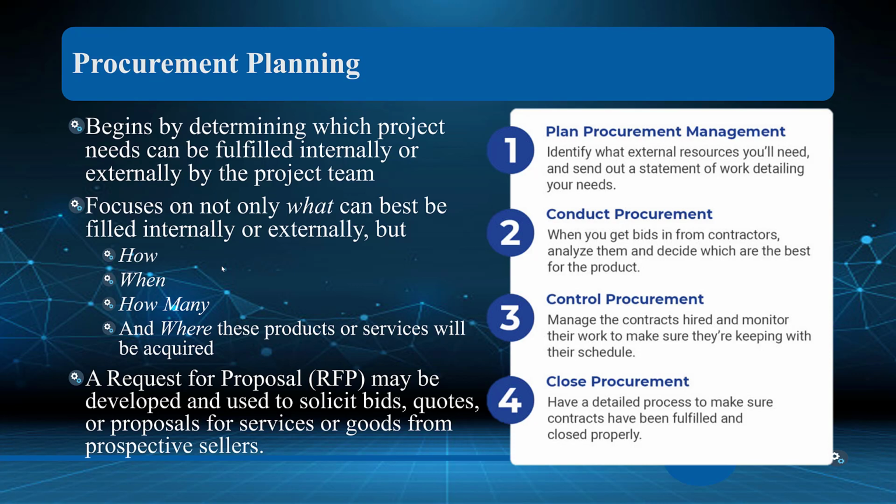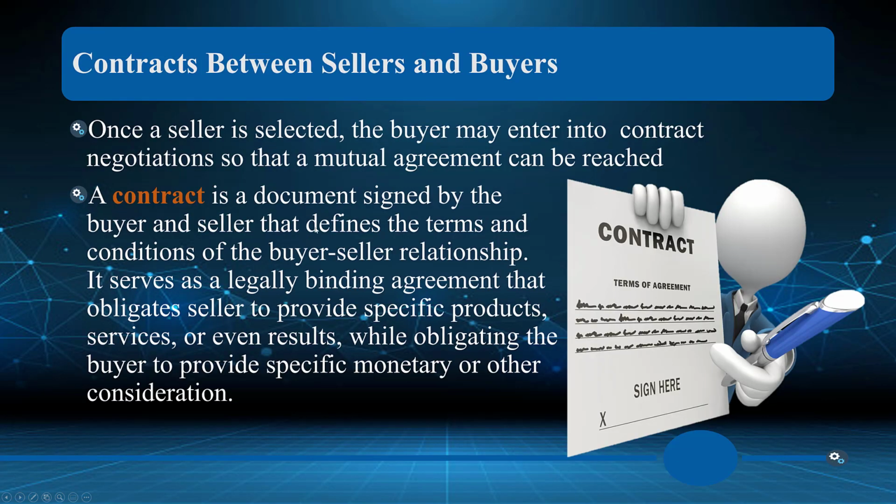And of course, we want to put out a request for proposal, develop and solicit bids and quotes, and get back these proposals to, well, we can offer this, while we see that a competitor of theirs or another opportunity for us offers this, a third doesn't do this, but they do this, so that we can really compare. And also that request for proposal becomes a contract that we can then hold that external entity to.